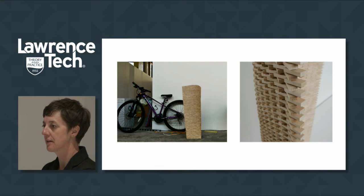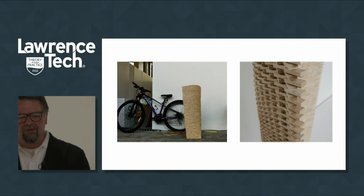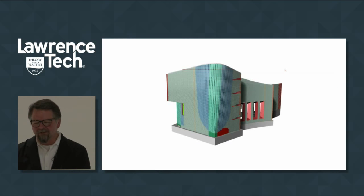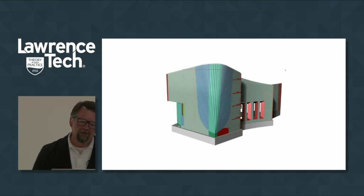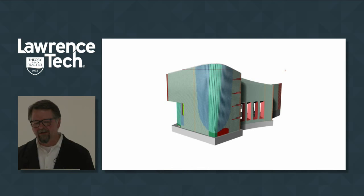Yeah, we did. We're not showing these, but we did a scheme with precast concrete. It was determined by our construction managers that all of the precast concrete companies were so far backed up because of the Little Caesars Arena that we couldn't get on anyone's list, so that went away. We looked at GFRC as a series of cast panels at a different scale than the precast. That kind of got lost along the way somewhere, and then ultimately we settled on brick as a way to begin to work.